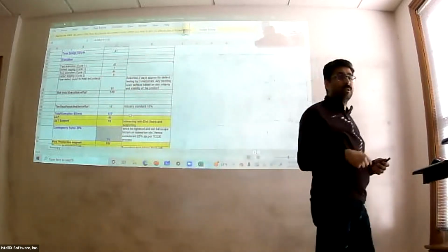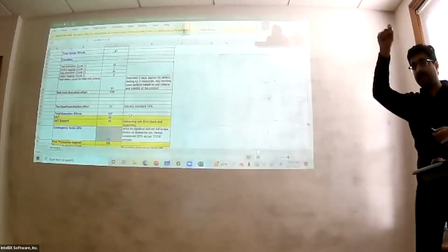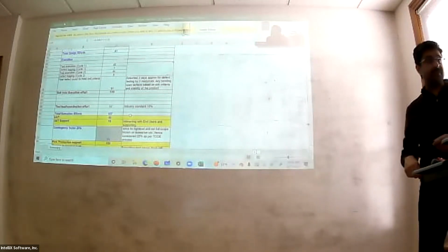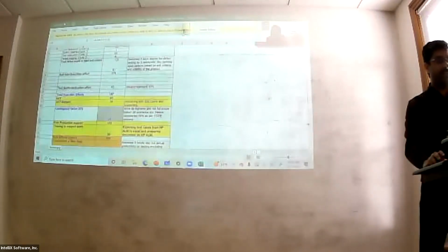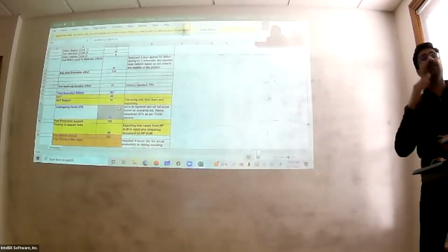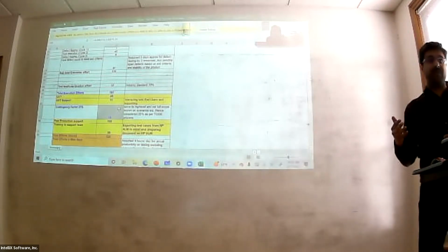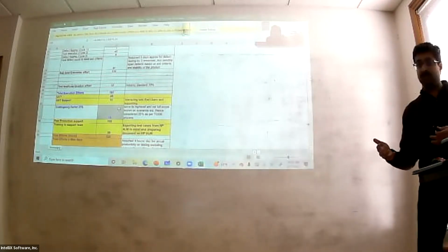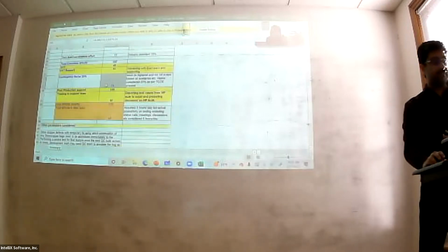Then I will need support, right? When users are testing, they will have questions. I may have to help them and show that, hey, I did this test, here are the results. So there needs to be some time for that. You add all of that, and then you add a contingency factor, essentially. What if I don't get people's responses in a timely manner? What am I going to do? If more defects are found, how am I going to deal with that, right? You add all of that, and then you come up with an estimate.